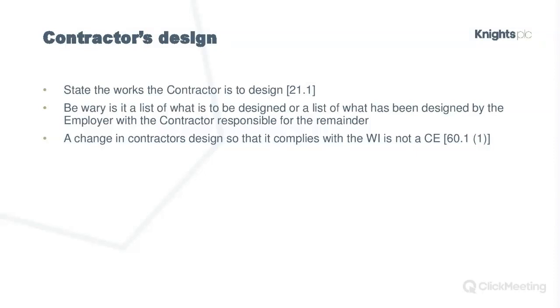So a clause that says you have no design liability, you're not responsible for any design, even if you carry out any, is quite a nice clause to make it clear that the intention is there's no design liability. That's A, any design changes are the responsibility of the employer. But B, if you inadvertently are helpful, you should be covered. You're not liable for that design.